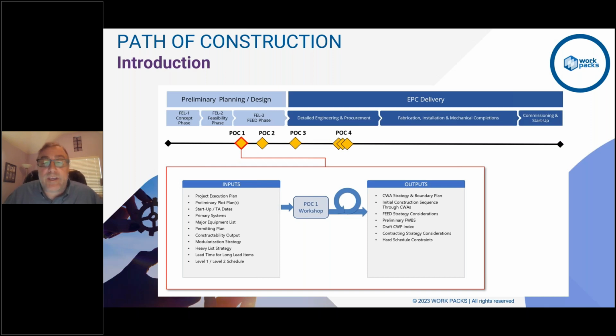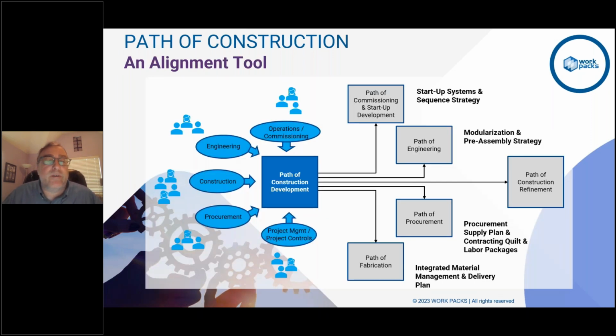And the contracting strategy and the contract quilt that you would go forward here. This is actually a great time to get a commitment to using AWP going forward as is, right? So POC 1, it's an iterative process, right? So you go 2, 3, 4, etc. So you need to involve a group of folks along these lines. It's iterative. It's not one and done, right?